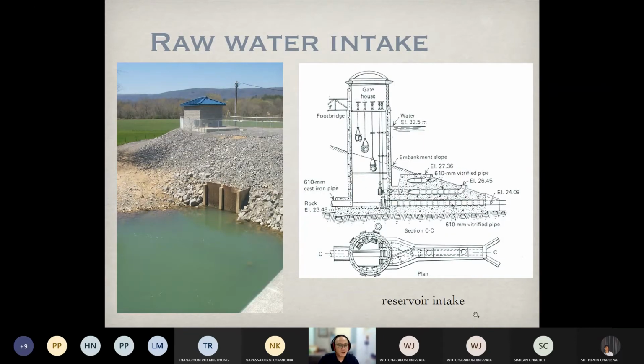So this is the reservoir intake. The photograph is showing the reservoir intake. Basically, these are intake structures located next to the reservoir. So the construction of this intake facility must be done along with the construction of the dam or the reservoir. These types of intakes consist of various ports, various pipes to withdraw the water at various depths.